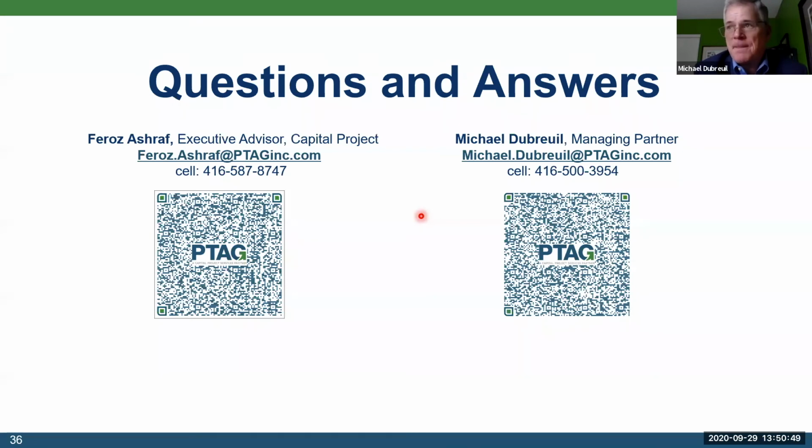Sure, absolutely. You know, we were on a project down, and I think Kenan at dinner with you down in Houston, we were on a $15 billion refinery ethylene plant project that went from 3 major scopes in the end down to 1 scope, where they took 2 of the big pieces out just because of financial considerations of the company and the opportunity to buy feedstock that they didn't need to refine. So absolutely, real life changes and contracting strategies have to change based on realities on a project.